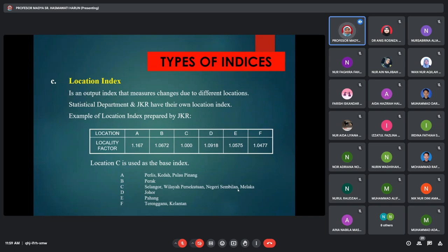If we follow logic, our logical thinking says that a location like the Federal Territory is higher than the surrounding areas. But it also gives some hints, because the difference in locations implies so many different things. For example, I take the most interesting area that I usually use, Kapit. Materials there are rather cheap, but to get to Kapit you have to use a lot of transportation to go there via waterways, etc. So it will inflate the price according to the remoteness of the area.